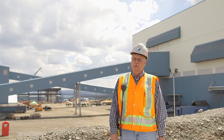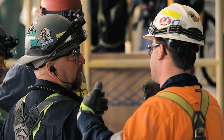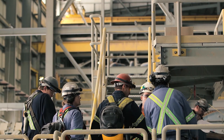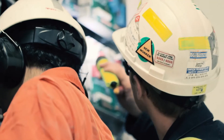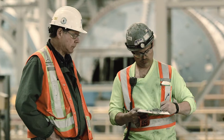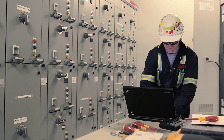In our relationship working with ABB as a team, when we have to go down and troubleshoot something or something has kicked out or gone down, we get our electricians, our electrical supervisors, and of course our ABB support person. They all get together and are actually being taught how to solve the problem and what to look for. During the commissioning and startup of the mill, we've had half a dozen people from ABB with different technologies who worked with our electricians and our people to understand the system prior to starting.